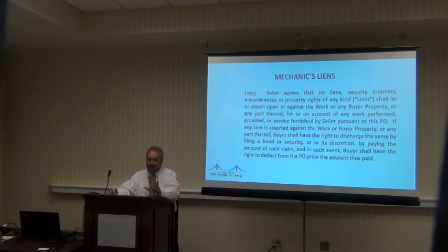The one thing, it's a sticky area. It's easy to understand, but a lot of people don't. In both the public and private acts, they allow for partial lien waivers and releases on progress payments. That was going to be my question. But you can only do those to the extent of the progress payment received, period.